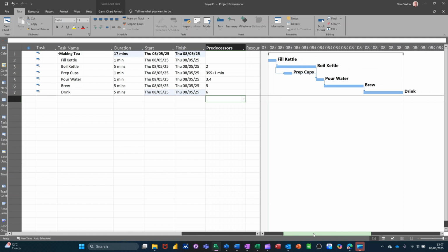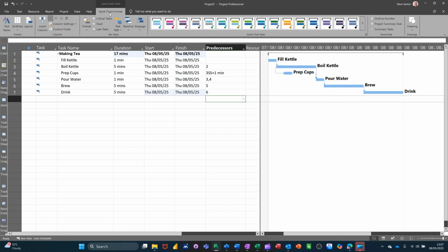But I want to display the critical path on this. So if I go to the Gantt Chart Format tab, I can tick critical. And everything will be red except for prep cups, because that can slide up and down that boil kettle task anytime while that's going on. That can be done. So that's your slack. That's a slack task on this one, but everything else is just critical.